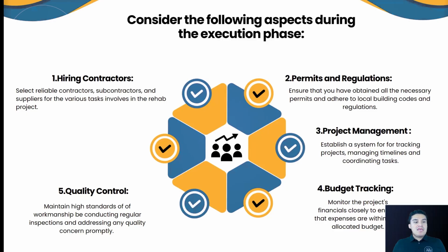Now, the contractor who's going to be doing the work for you, they should know about these things that they have to work on in the property that will need some sort of permits and regulations, okay? They are the ones who will define, hey, you know what, we're going to need a permit for this, we're going to need a permit for the AC, we're going to need a permit for the roof. I'm just giving you examples because for those things you pretty much always need a permit, okay? AC and roofs. But just giving you an overall idea, you're going to need permits for the windows because they need to be hurricane proof in this area, and so on, okay?